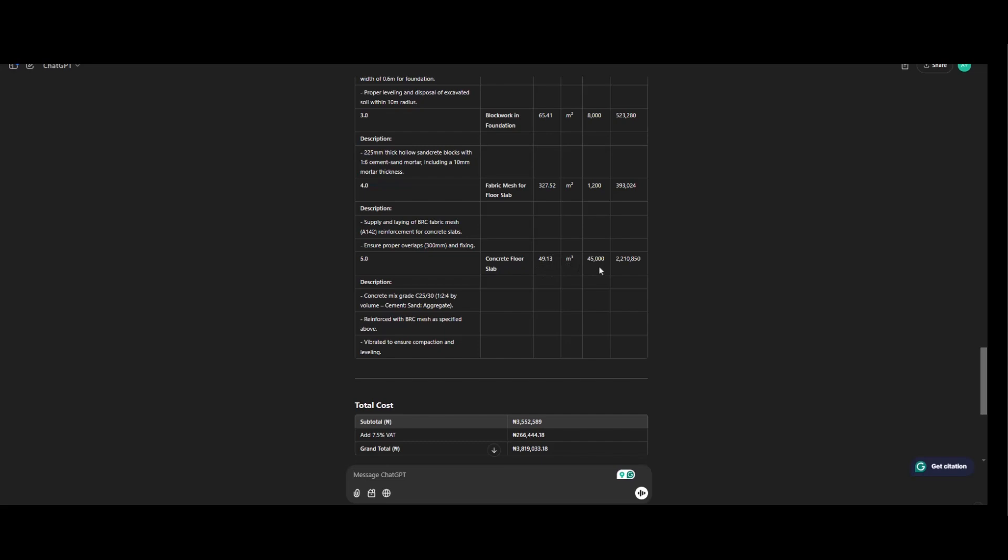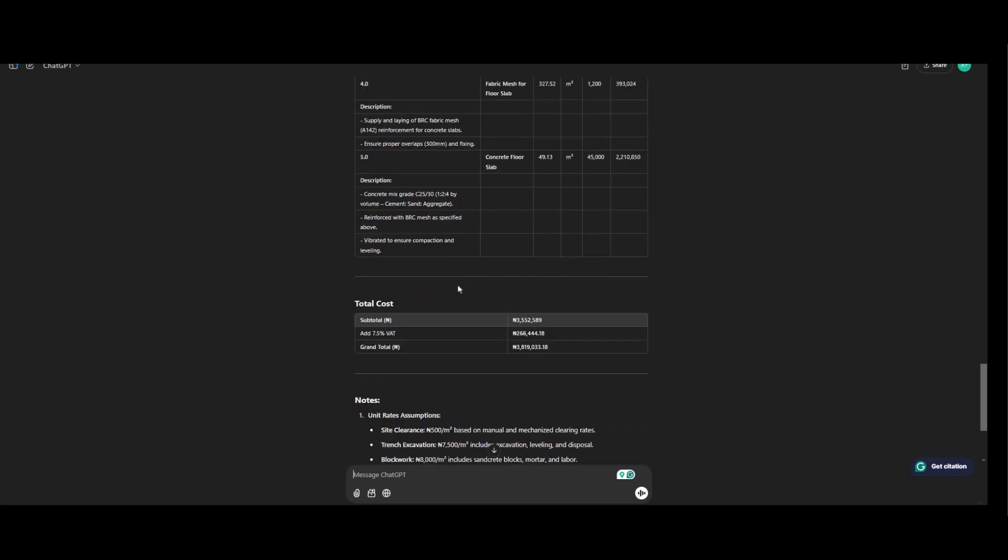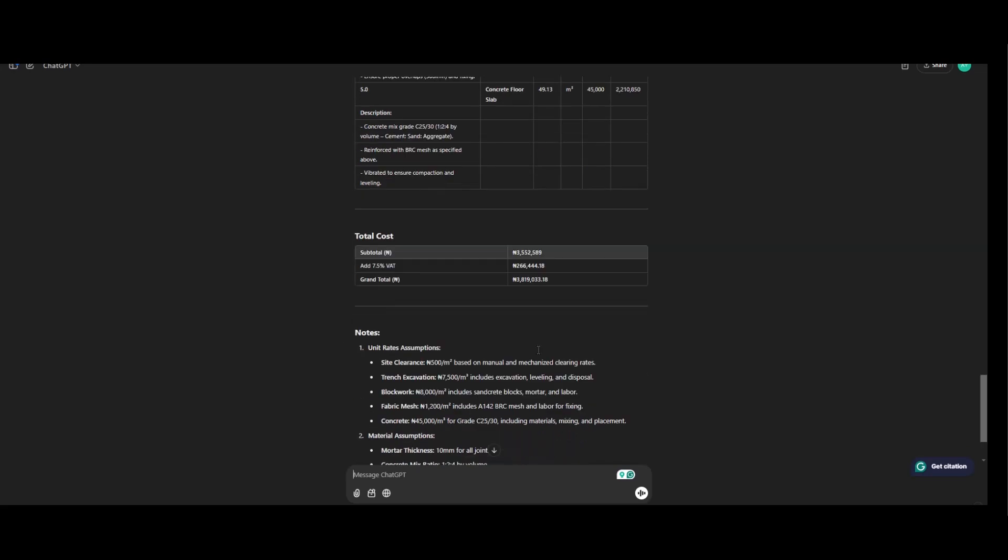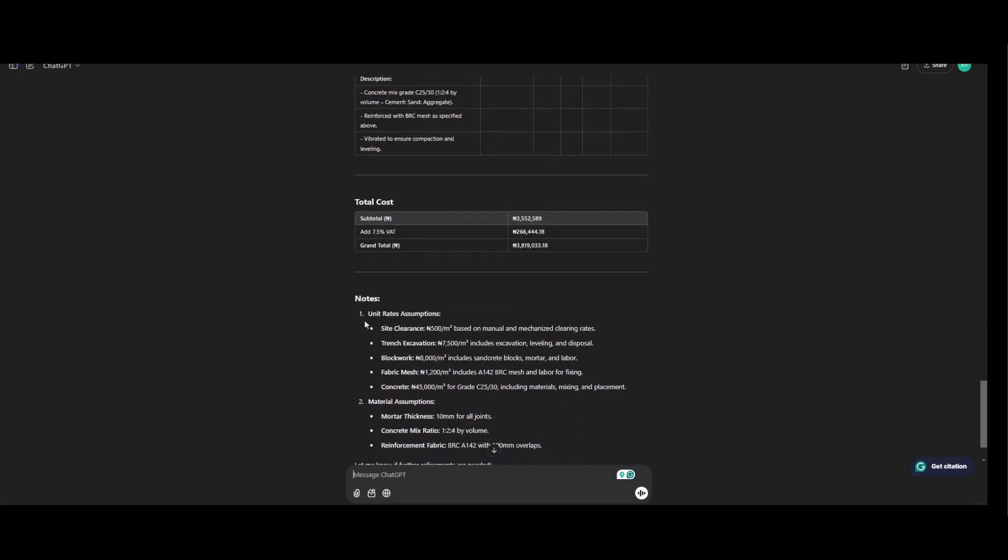And it is measured in meter cube. And it is priced 45,000 per cubic meter. So this is the total cost. When you add everything together. We have 3.5 million. You add in VAT. 7.5 percent. And this is the total price. So we have a note on that.